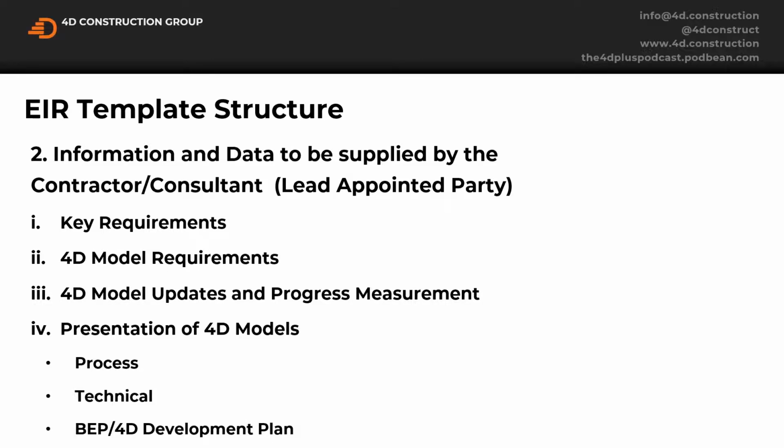So if you're delivering a big highways project, a rail project, building a city, and you want to understand your master program and stitch these 4D models together to understand what a macro view might look like, or understand the interfaces between different packages, it's very difficult if they're not in the same software. Very difficult to export, very different levels of detail, a really impossible task.